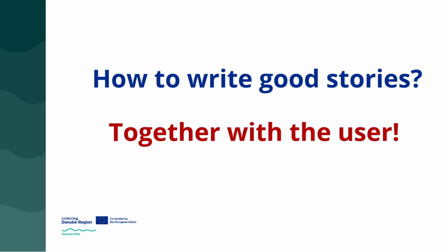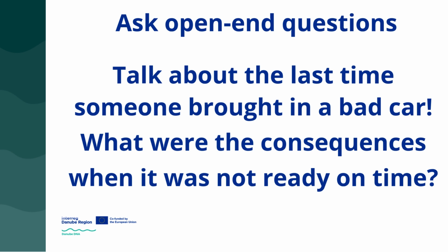If we conduct interviews with different stakeholders, this is a well-established method for building an initial draft of the story map. It is essential, however, that we focus on open-ended questions rather than putting words in the user's mouth. We should avoid simple yes or no questions and instead let them tell their own story. For example, we can ask them to describe their last experience with a faulty car brought in for repair, or what happened when a repair did not get completed within a single day. If we listen to these narratives, we can create a high-quality user story map that captures the key goals necessary to ensure satisfaction for both the driver or car owner and the workshop owner.